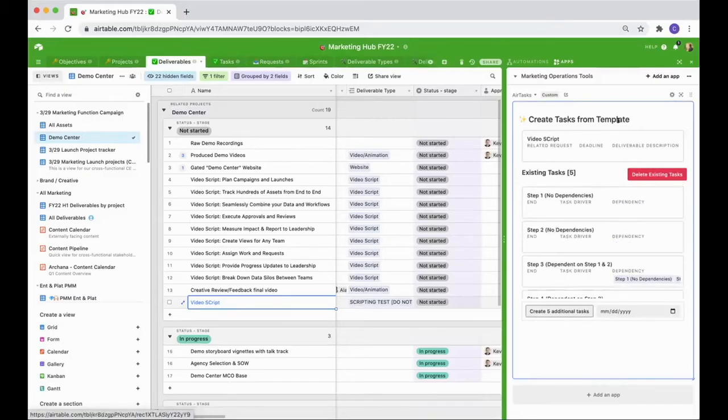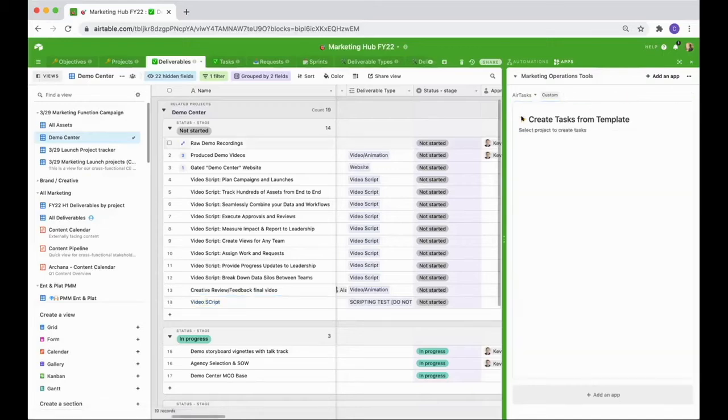That's crazy. What I'm used to having to do is, at the beginning of the quarter, during quarterly planning, we say, okay, we're going to deliver this. We've been asked to complete a white paper by this date. Okay, it's going to take a week to design, so we need to have it to the designer by that date. We need final copy by this date. We're going to need final approvals by this date. If this sounds familiar to you, it's an incredibly painful process, all just to get to the point where you realize you should have started it 2 weeks ago, right?